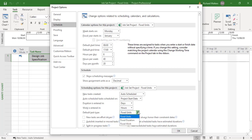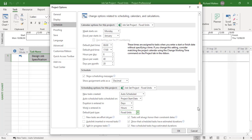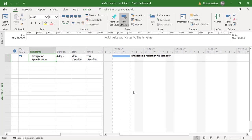So we'll try fixed units first. Then there's fixed duration and fixed work — those are the three types. For fixed units, we've assigned an engineer manager and an HR manager to a task called 'Design Job Specification'. In this example the HR manager is only required for 20% of the time. By default it's a 100% allocation of a resource.